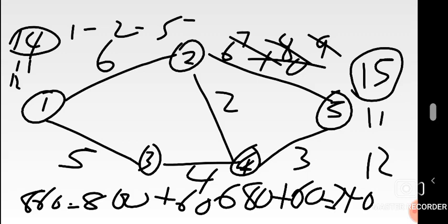920, right? Okay, the crashing process is obviously not done, and we have 2 critical paths. What do we do? Well, first of all, finish off the one you started with, which is still a critical path apparently, and then shift your focus to the other one after, to see if your project can still be improved any further or not. So we were on 6. They said this route can be crashed to 5 days. Okay, go to 5 now.